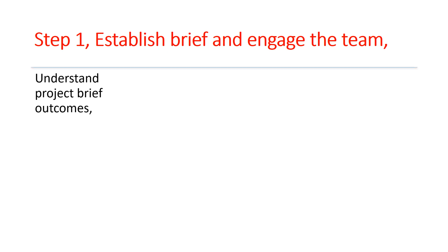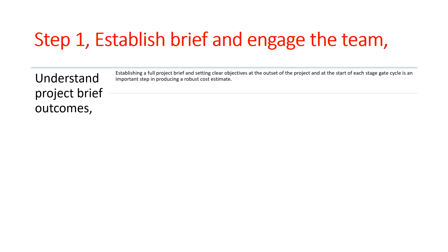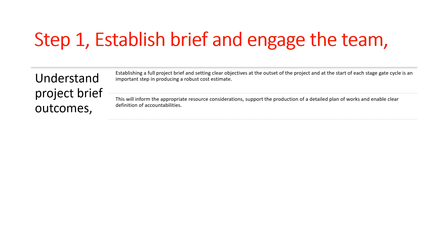Step 1: Establish Brief and Engage the Team. Understand Project Brief Outcomes. Establishing a full project brief and setting clear objectives at the outset of the project and at the start of each stage gate cycle is an important step in producing a robust cost estimate. This will inform the appropriate resource considerations, support the production of a detailed plan of works, and enable clear definition of accountabilities.